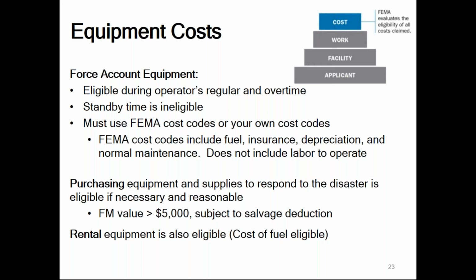Equipment costs can be eligible under this program. I'm not exactly sure the types of equipment that will be used for this COVID-19 pandemic, but it is very possible that there is some. I would expect possibly vehicles or emergency response equipment, something of that nature. Just keep in mind that you need to be tracking this equipment time, and keep in mind that force account equipment, and again, force account means your owned equipment that you as an entity own yourselves, that equipment does not go on overtime or regular time. All time that that piece of equipment is working with one of your employees can be eligible time, so please track that. Standby time is ineligible.